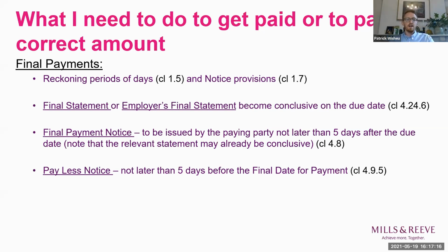Then the next step is, again, there's the opportunity to give a pay less notice. So this can be a second bite to try and address anything in the payment notice. And again, it's the amount due as at the date of that notice.